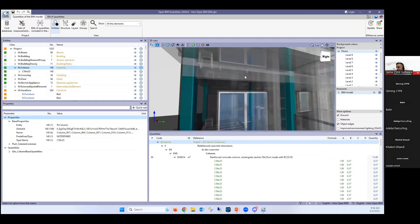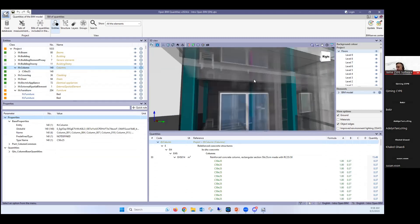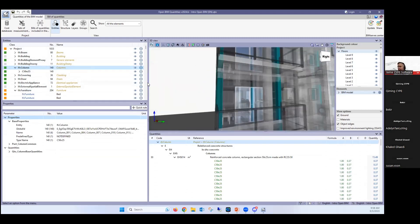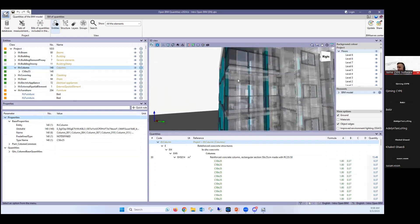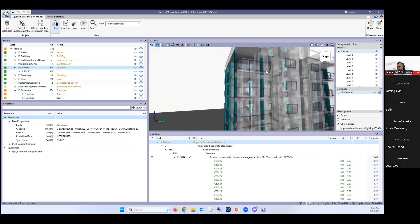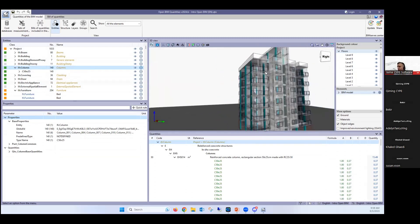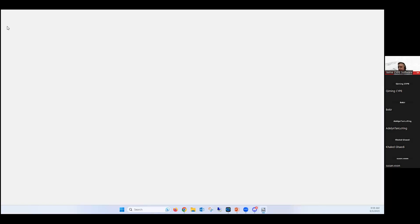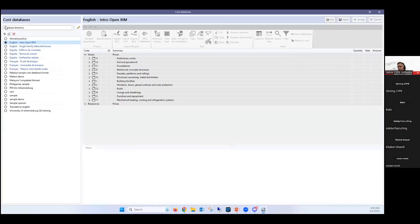And now this model, I've imported it automatically and all the measurements they have been extracted automatically. Now, what I have to do is I have to link this with a cost database. Or, and I have to create some set of measurement rules.